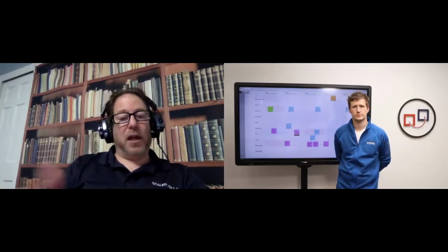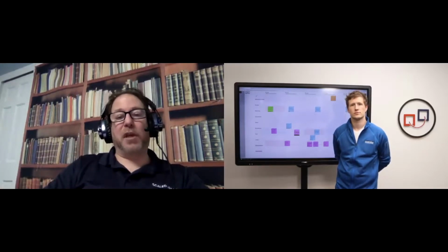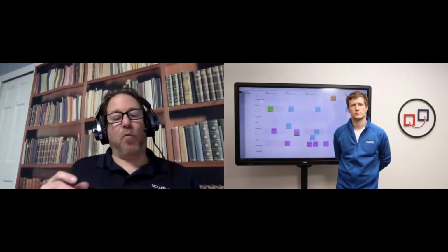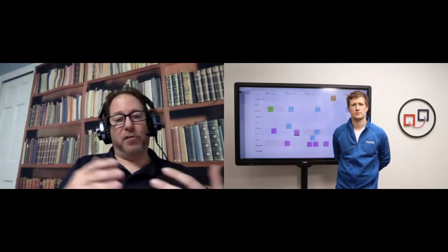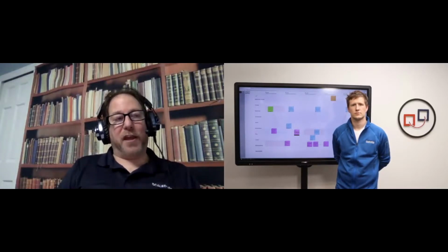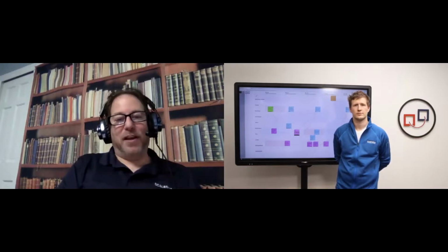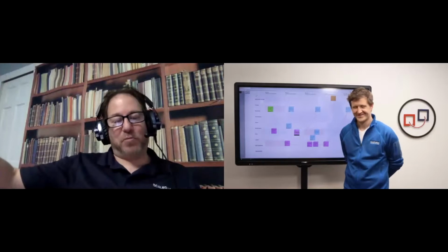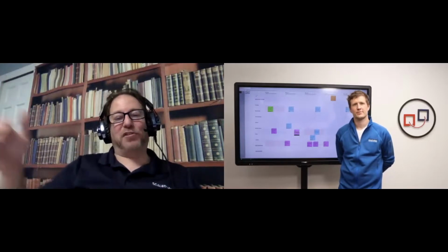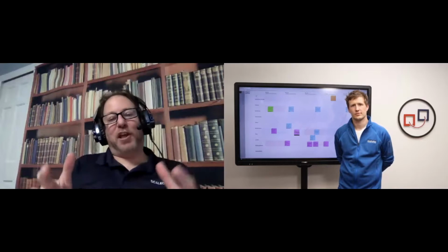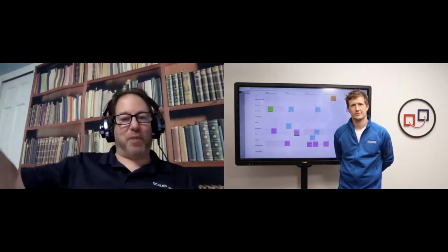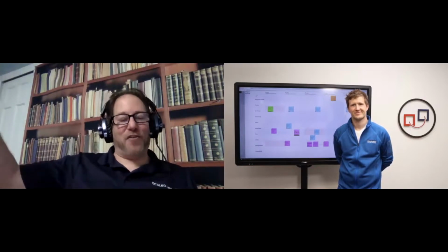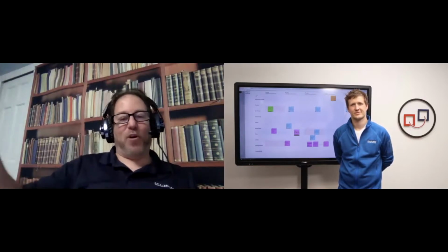Also, you need to schedule some meetings. Be more mindful about when we need to meet with the other geographies, and how we are going to do that. Another big thing is don't focus all on the main group and not on the other remote groups. Nothing is worse than, because everyone is typically in Colorado, we'll have all the Colorado people go, and then we'll do China and Japan, especially if it's late at night on their end. They're going to be really bored and not feel engaged.